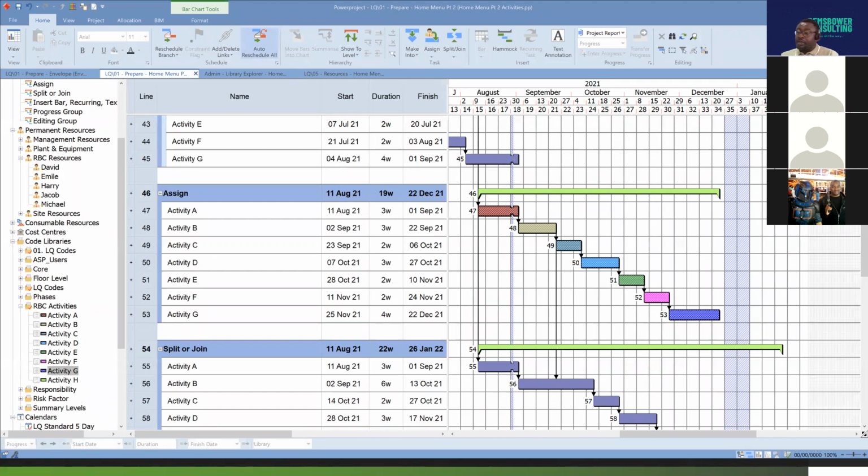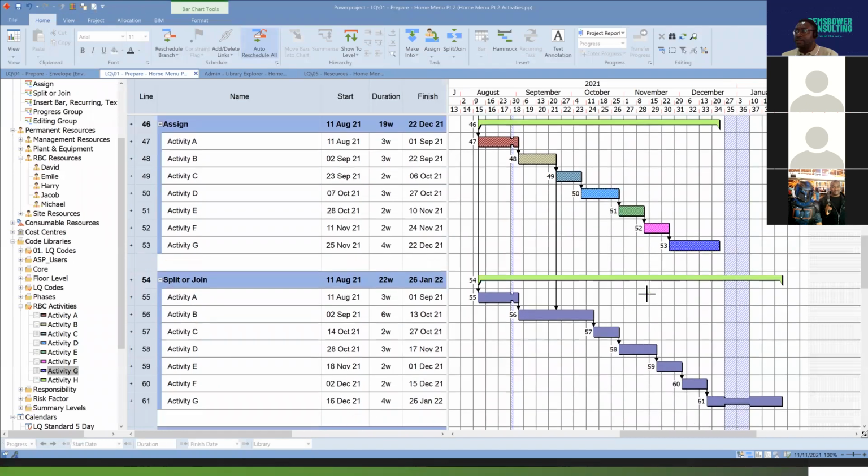For example, you could assign a calendar that defines the hours of daylight to a task that can be carried out during daylight hours. And you could assign a calendar that defines the hours during which a plumber works to a plumber permanent resource. Okay, so that's basically what a calendar does.